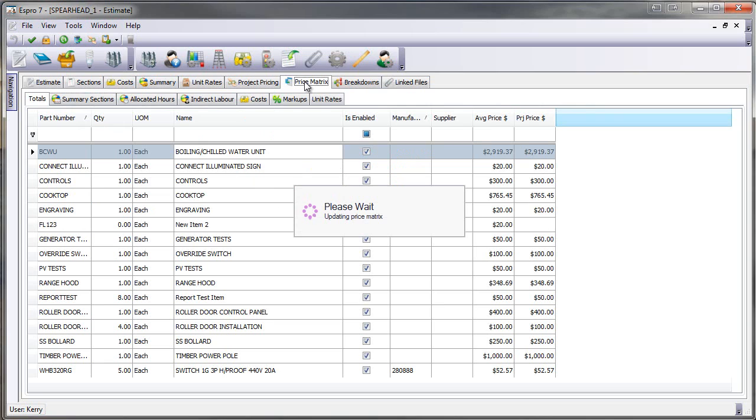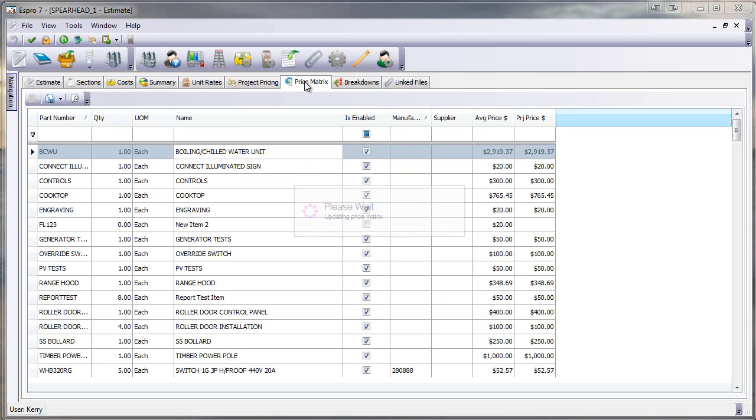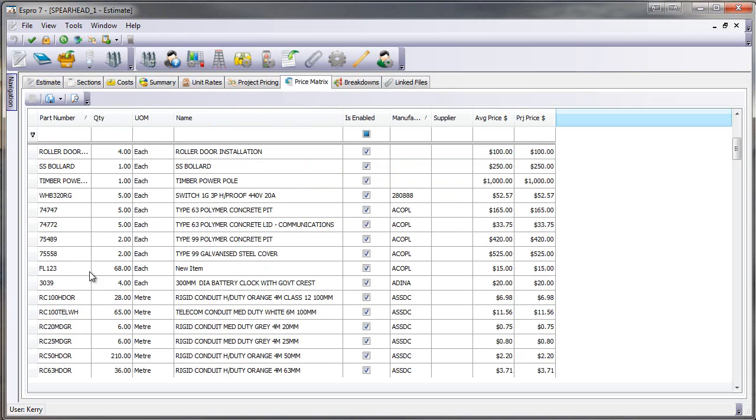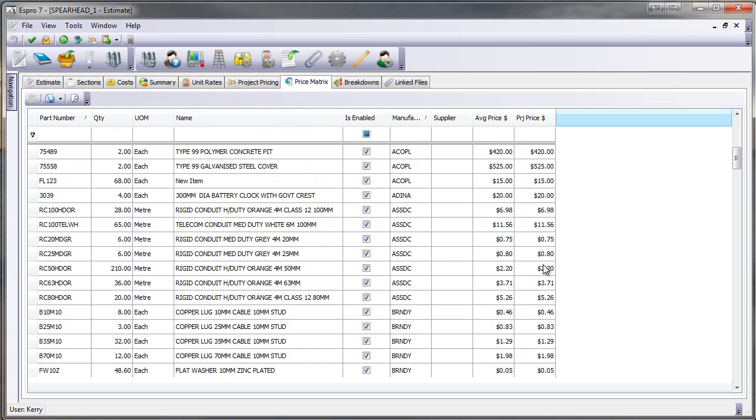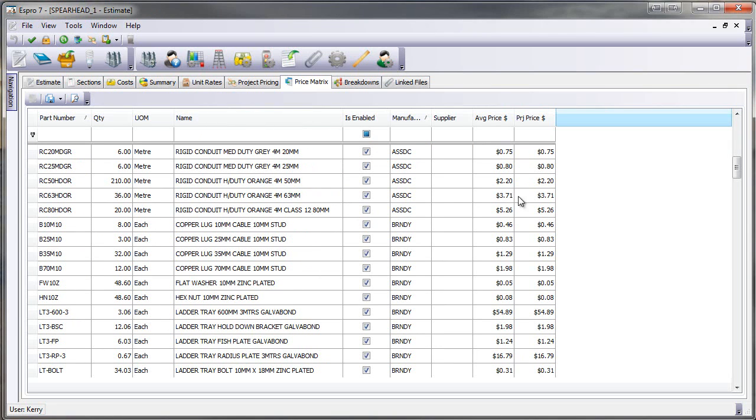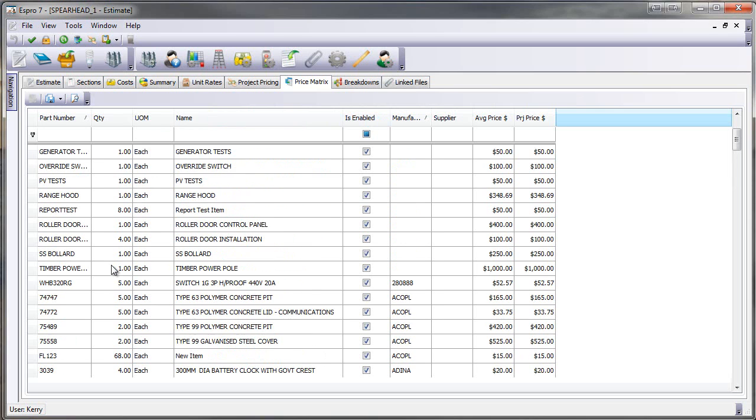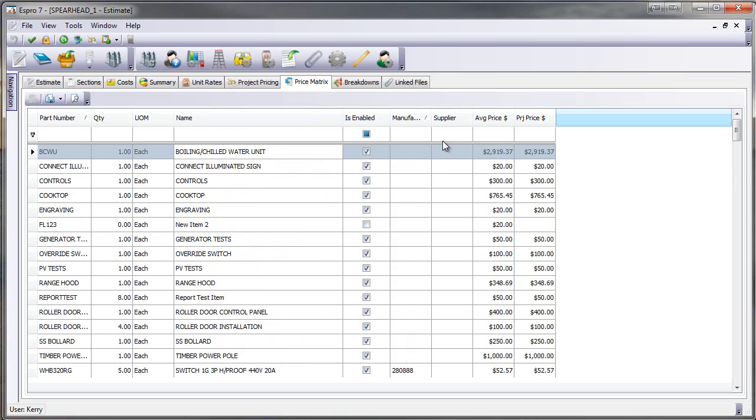The price matrix. This is in the old Espro where we had project price matrix. This now shows all of the material items that are in this estimate, the quantity, and then I can just run through and change the project price and it will automatically update every single place that each of these parts have been used. Very easy, very efficient.